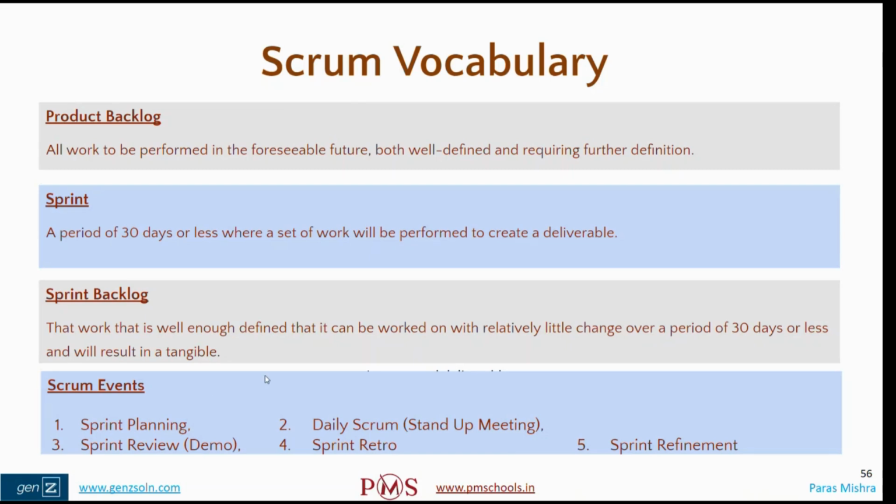What we decided, we will lay the foundation. We will dig the foundation and we will lay the foundation. These are the two backlog items. That was our sprint backlog. Now after 30 days, as a product owner, I will go and review whether that has been achieved or not. If achieved, has it been achieved to my satisfaction or not. That is the sprint review.